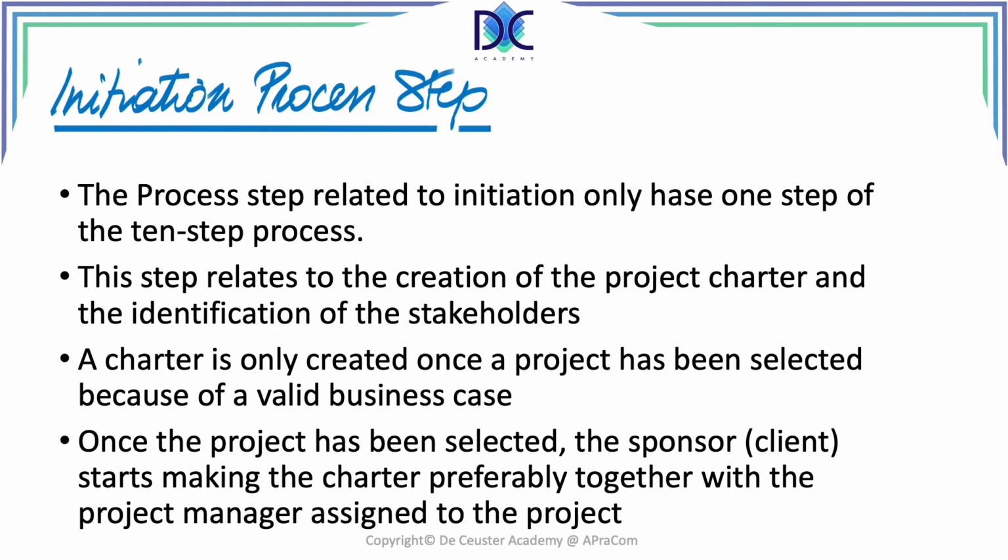Now, once the project has been selected, the sponsor starts making the charter, preferably together with a project manager assigned to the project. The earlier a project manager is assigned to the project, the better results can be expected. And it's both the technical experience of the project manager together with the needs of the sponsor that you can create a good charter that describes everything. It's very important to have a clear vision on what's going to happen.